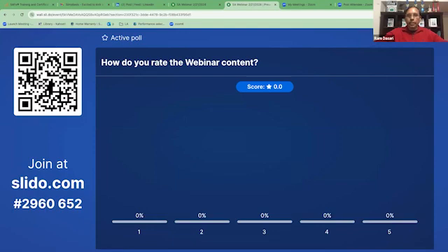Each of those features gets decomposed into stories. The difference between stories and features is that stories need to be completed in 1 sprint, in 2 weeks. So you have the strategy, you have the execution, and you're now connecting the strategy and execution. You started from top down, got into the Agile Release Train or ART, and did what is called PI planning, as you said, which is a cross-domain planning that happens upfront before the PI starts. In that PI planning for 2 days, you are looking at the vision, you're looking at the business context, and the teams are in breakout sessions trying to identify what stories they'll be working on.